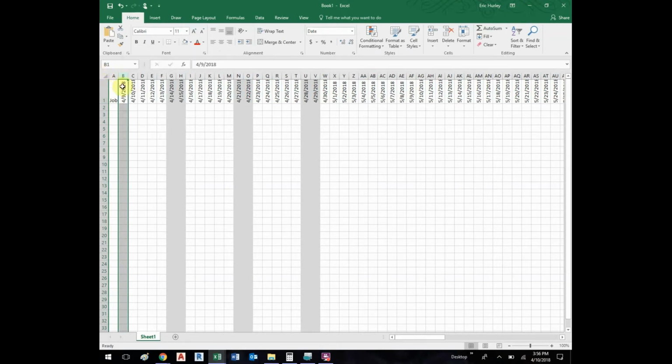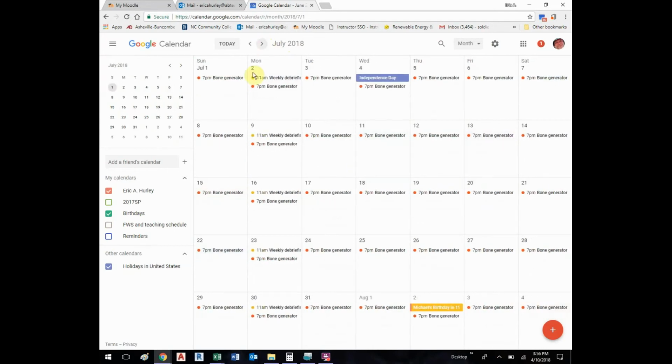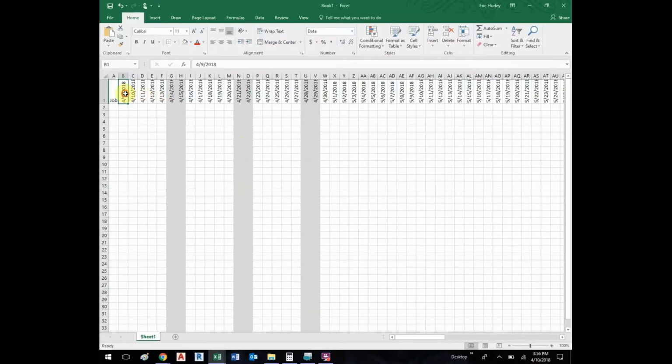I just started it out as a Monday. That's the reason that I added it in, because I started on a Tuesday, because yesterday was Monday. If I start all my spreadsheets as a Monday, then I can go in here and let's say that I'm not going to start the job until July 16th. Then I can go in here to this one cell and I can say 6/16/2018, bam, everything changes and the weekends stay the same.